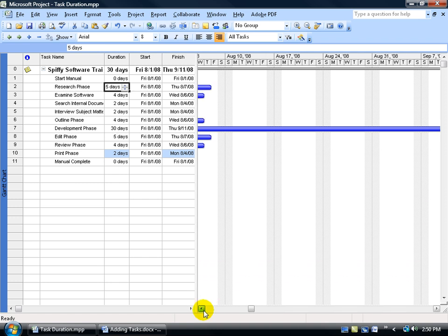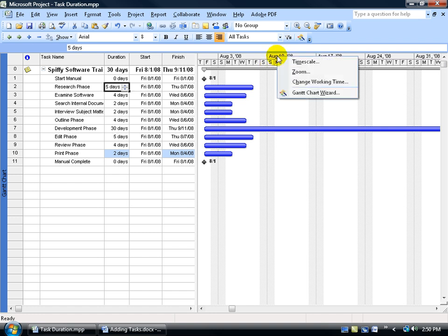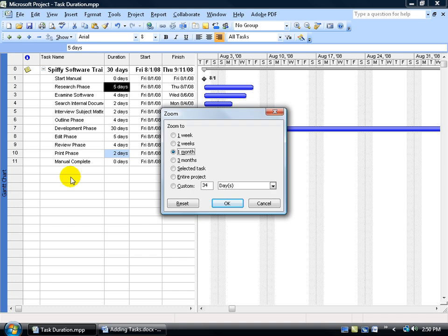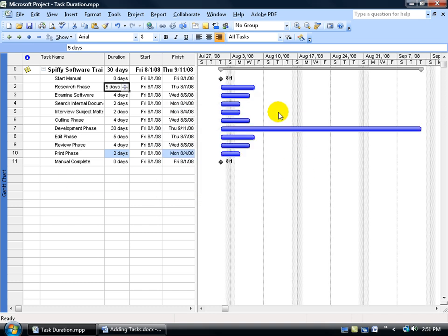Instead of scrolling back and forth, the shortcut to be able to view it in a condensed screen here is by crunching the timeline. To crunch the timeline so you're not viewing it every day here, just right-click on the timeline, and go to Zoom. Or you can come up in the View menu, and go down to Zoom, and say that you want to see the entire project here, and click OK, and it crunches the timeline. So it's not every day of the week. Now you've got, like, skipping from Monday to Wednesday to Friday, so it can fit everything here, so we can see how it's going to look overall.